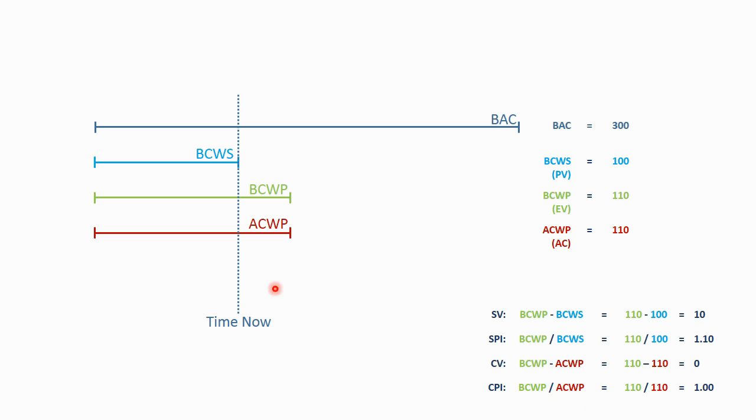So this too is part of the value of the earned value technique. If all you looked at was expenditures versus your plan, if you looked at the actual cost of work performed compared to the budgeted cost of work scheduled, you would say to the project manager, you were only budgeted 100 hours by this time period, but you spent 110. You're overrun. That's the wrong message. That's the wrong conclusion. The earned value method has you look at the actual work performed.